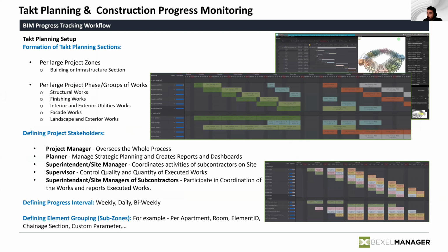I mean, one of the examples, let's say. If we have to execute on the stadium these concrete piles, and if I'm the subcontractor who's focused on a certain area for the concrete piles where I have to execute 20 concrete piles in 5 days, honestly, I would like to have the ability to schedule every one of them, because every one of them is 15, 20,000 US dollars. It requires a lot of materials, or a lot of resources. So I want to know the exact sequence of execution.